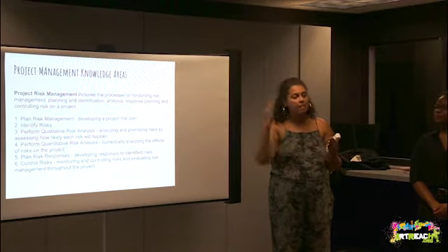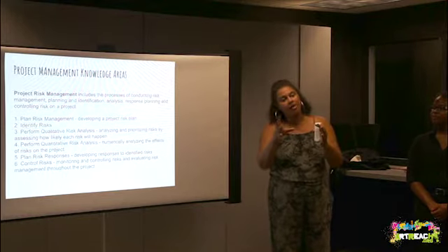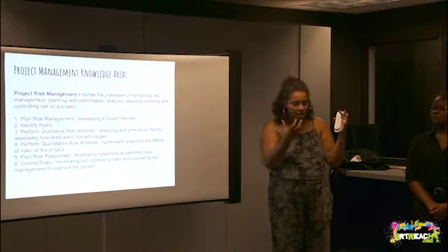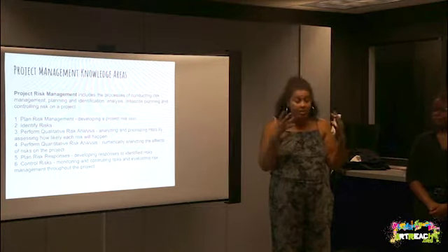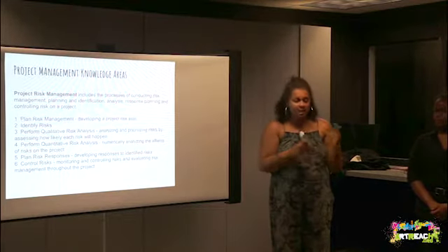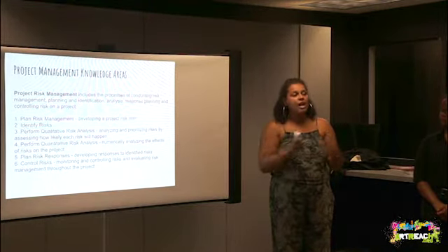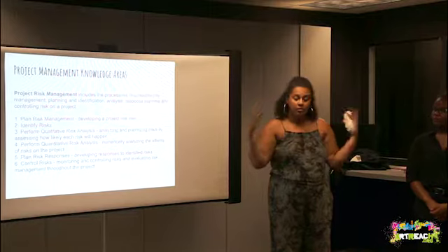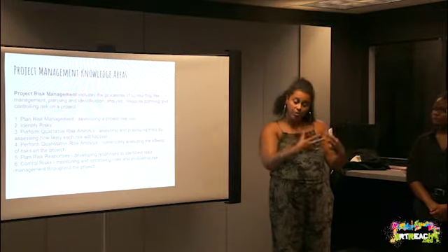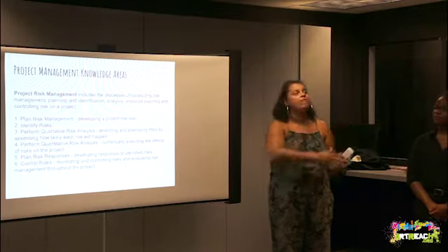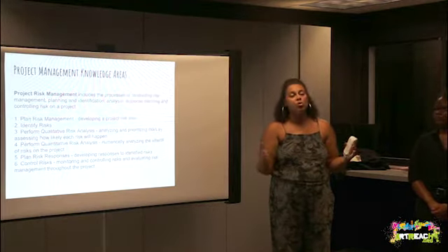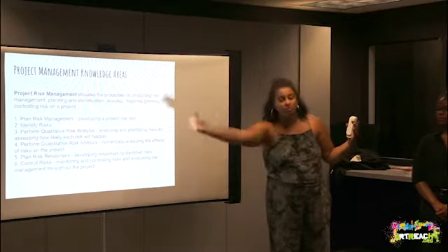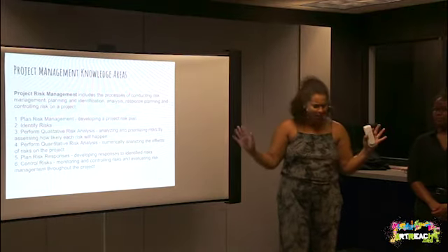Do we need counseling set up? If this happens, are we ready for that? Because if you know your lived reality, and it's a potential lived reality based on where you live and what you're experiencing, it's a risk, and you have to plan for it. It sucks and it's very morbid. But had they planned for it, the project wouldn't have stalled for so long, because they would have said, all right, if this happens, this is the timeline, we're going to regroup, or maybe we switch the project. Eventually they did regroup and ended up switching up the whole project, redoing the documentary dedicated to that person. But it took them off track for a very long time, obviously, and rightly so.